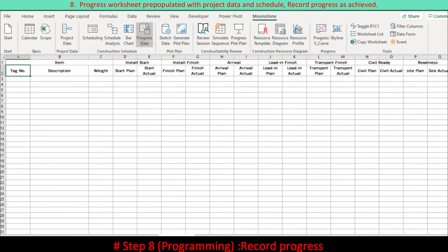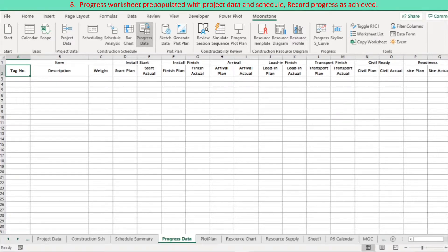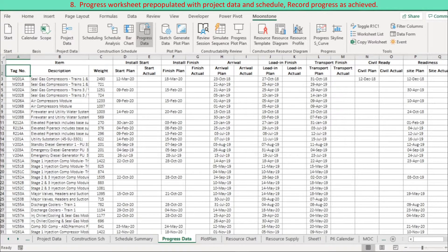A placeholder is used to record actual progress. The progress worksheet is pre-populated with project data and schedule data, and actual progress is entered as achieved. The progress data are reflected into visualization tools and aggregated to represent a high-level summary including a progress S curve.